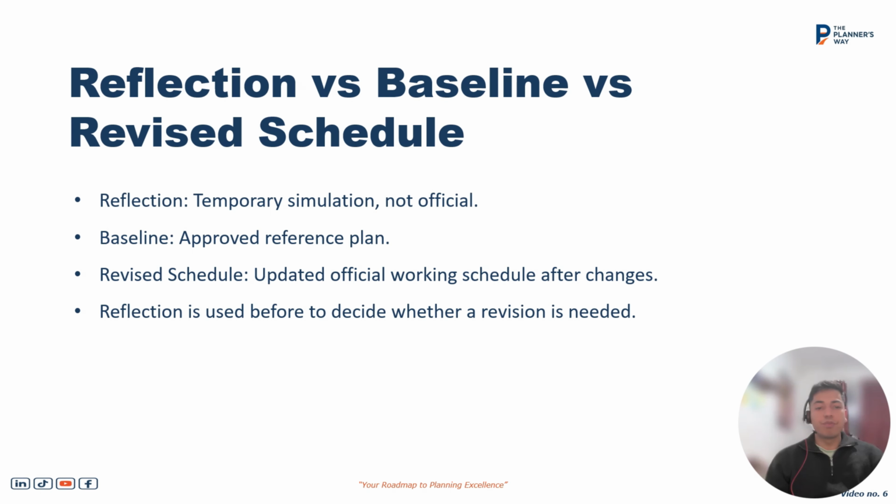Baseline is the approved version of the plan agreed by all the parties or all the stakeholders. Revised schedule is the updated official working schedule after making the changes. Any reflection copy of the program could become the revised schedule or the recovery schedule once it has been approved by high stakeholders. While submitting the revised schedule or the recovery schedule, we need to understand the different scenarios of the changes we are making. On that instance, we can make different versions of the reflection program, and once they are approved, they may become the recovery schedule or the revised schedule.